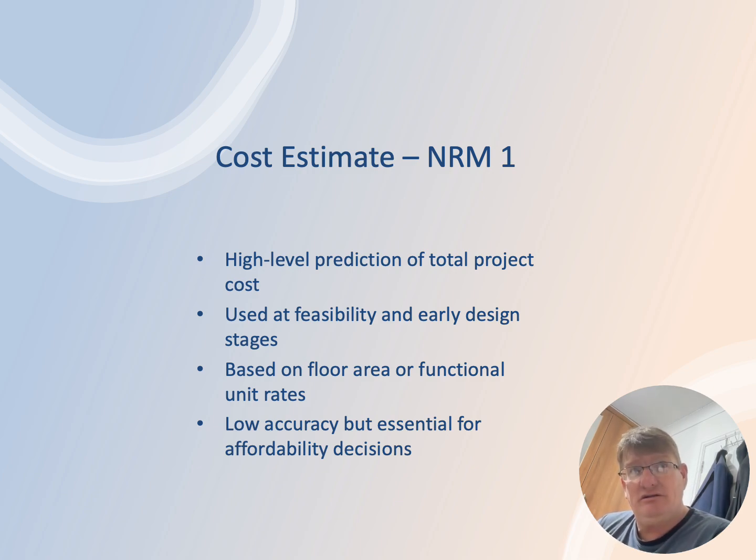It's based on the quantification part of it, which is the gross floor area or functional floor area. So it's very, very basic. And as I said to you, the RICS produce guidance on what we mean by gross internal floor area, what we mean by functional floor area. So again, there's a very standardized, very structured methodology to everything that we're doing. So, quite scientific. That's why in today's world, we're not just quantity surveyors or estimators. We are actually value engineers. We're cost engineers.